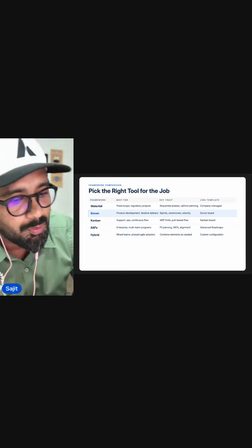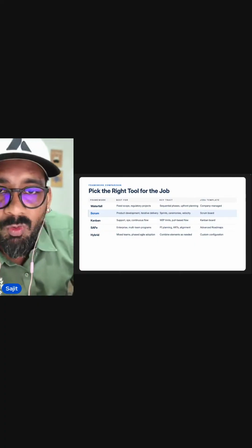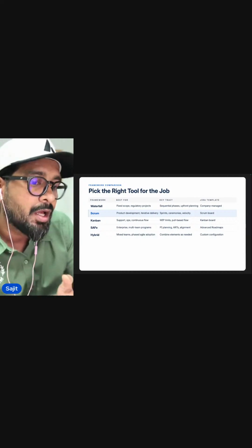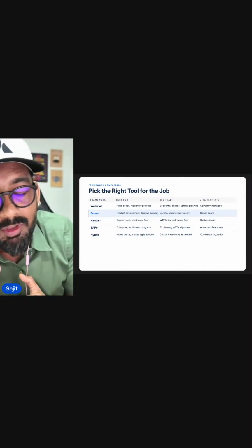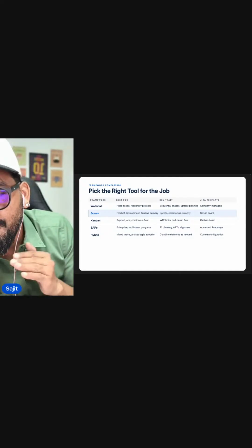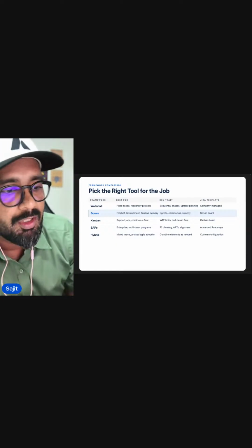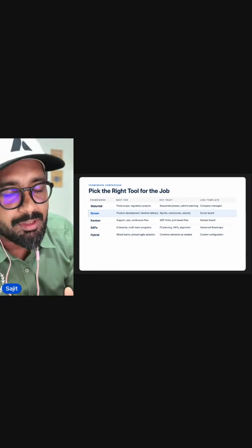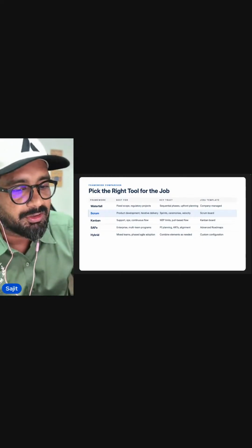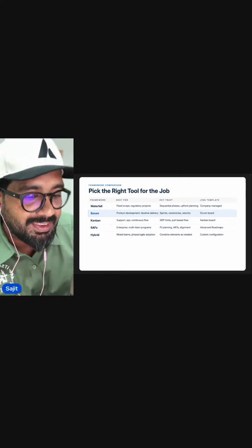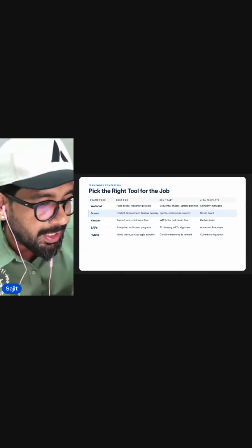In Kanban, you would want to pick one, work on it, finish, pick the next, like how you would work in a support model, because work arrives, you prioritize it depending on what the customer wants and on your availability. You pull it, you finish it. There are work in progress limits. That's the key term, because you wouldn't want to have 50 items in progress if you have a small team. So have your work in progress limits set and then move it across the journey.